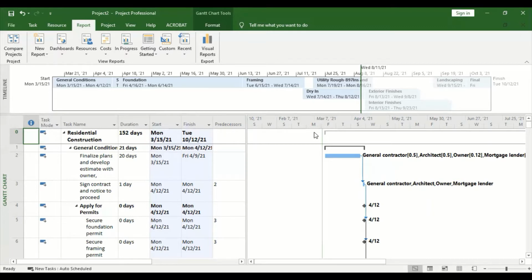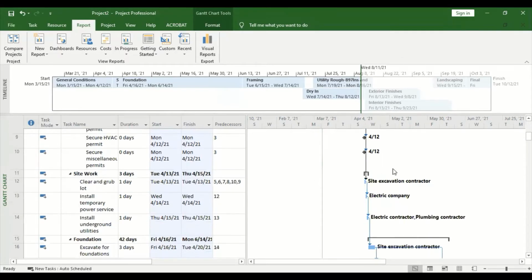Then also we're going to cover resource leveling. Like how do you ensure that your resources are not over-constrained? Because you may find that you only have 2 project managers on the site, but you have 100 tasks, and almost on each task you are assigning a project manager to be part of the task. That means you are overallocating that particular resource, so you are over-constraining it. Resource leveling helps you to get away with that, in that you're not over-utilizing or exhausting resources, and also you're not underutilizing them.